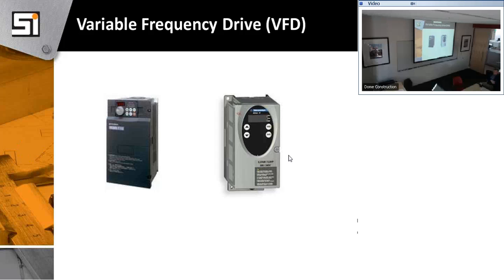If you guys install it, do you guys do the programming on the VAV and adjust it? The controls contractor would be doing the... On the VAV? No, on the VFD, yeah, because he's controlling it. No, I would disagree. My service startup, you're going to put that on my service startup? No, actually, what I would prefer to do, and what we do here at Genentech, is we have a separate VFD startup contract that actually does the startup and checkout. Separate drive. Yeah. And I put it on you guys in the past too. I would agree. Make sure it gets done. I'm a mechanical guy, so I lie sometimes.